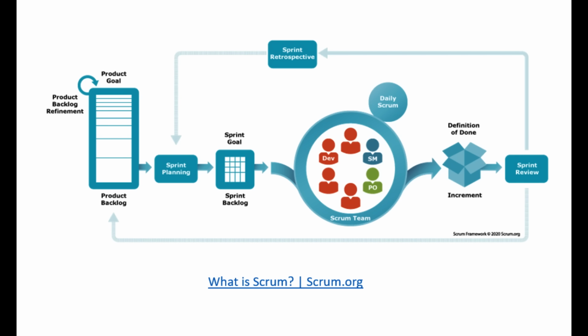Let's focus on the sprint structure in a little more depth. First, note that the project work is divided into work units called user stories. These work units form the product backlog. Product backlog should be prioritized and refined continuously. Before the first sprint, the team needs to meet and refine the top priority user stories. Then the sprint starts with a sprint planning meeting. During this meeting, refined stories that are needed for the first product increment are picked up by the team members. Then the team starts working on these items.